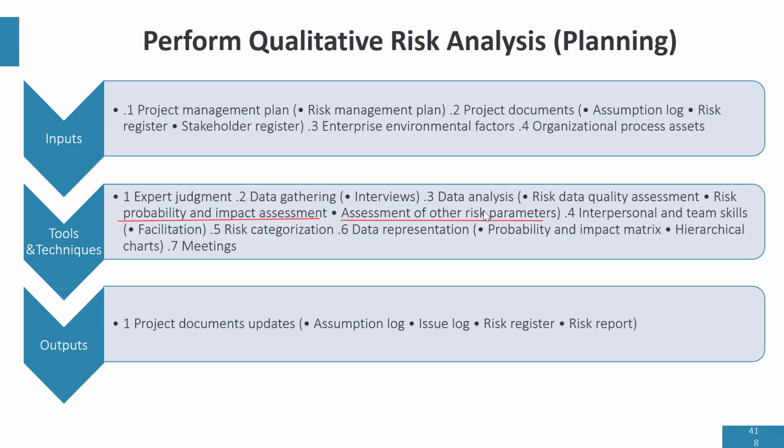We have other risk assessment parameters like priority, urgency, manageability, and propinquity. Propinquity talks about how close the impact of a risk is in affecting the strategic objectives of the project.